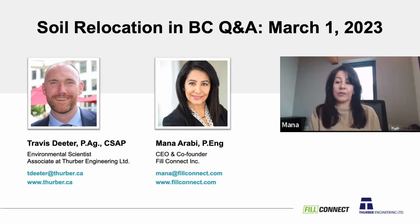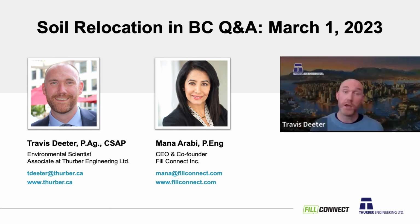So the next question is if it's moved within the same site. So yeah, if it's your own site, then no, you're not required to file a notification. I will say that the rules for contaminated soil still apply. So if you know that is contaminated material, it cannot be put back in the ground once it's been excavated out of the ground. But yeah, if it's just clean soil and you just want to dig it up from one side of your site and place it on another, that's fine.